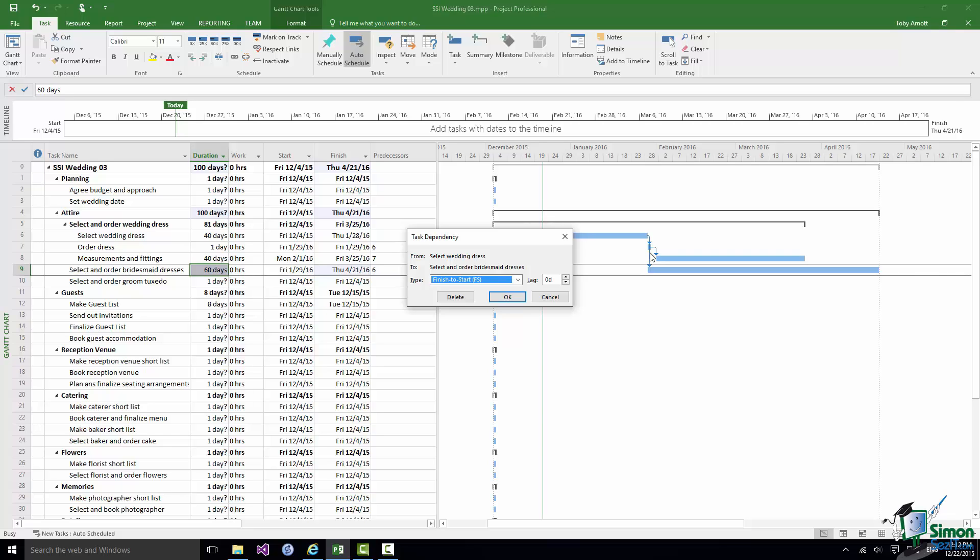Now if I had decided in this particular case that after the wedding dress was selected and at the point that we were going to order it we could certainly start looking at selecting and ordering bridesmaid dresses but we needed to leave a gap of say five days for some reason, that would represent a lag of five days.